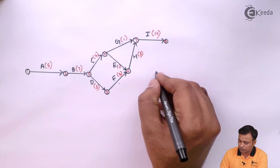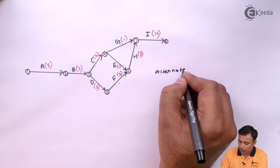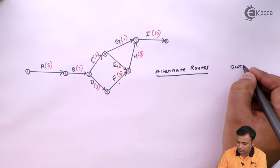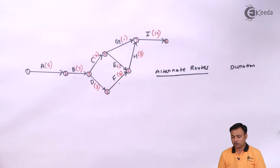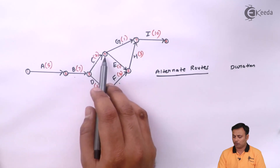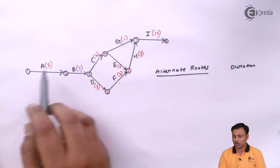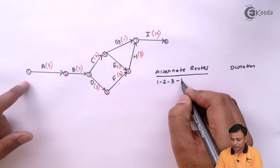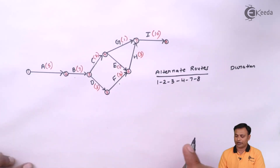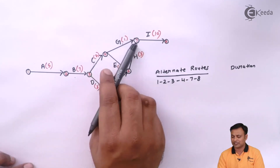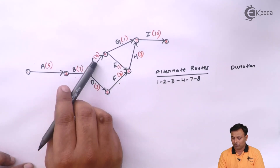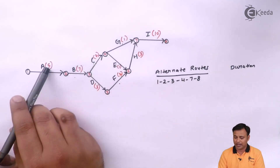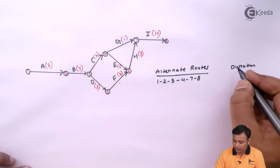Listing alternate routes from node 1 to node 8. My first route is 1→2→3→4→7→8, with durations 5+7+2+1+10 = 25. The second route is 1→2→3→4→6→7→8, with durations 5+7+2+3+3+10 = 28.